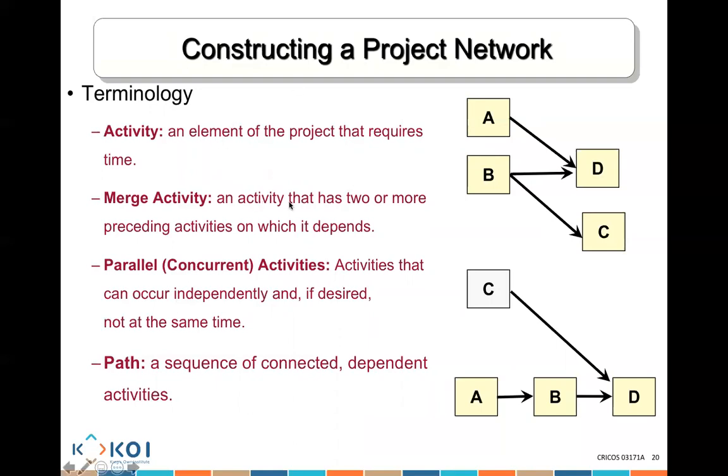Merge activity: an activity that has two or more preceding activities. So there are two activities before it. Great. So for D, there are two activities merging into activity D that we need to bear in mind here. That's what I call a merge activity.